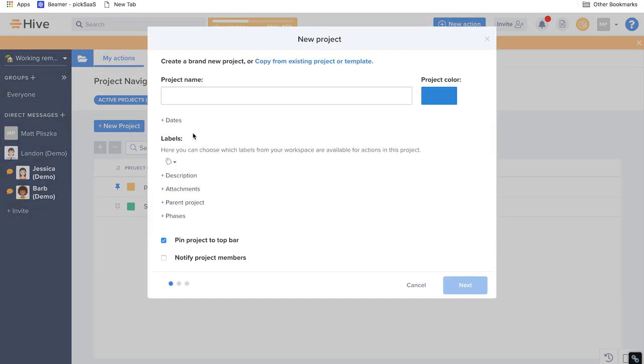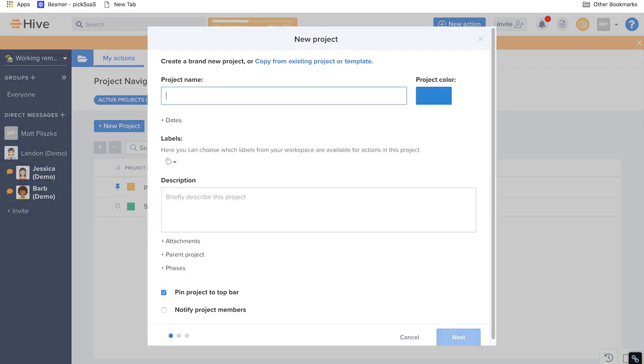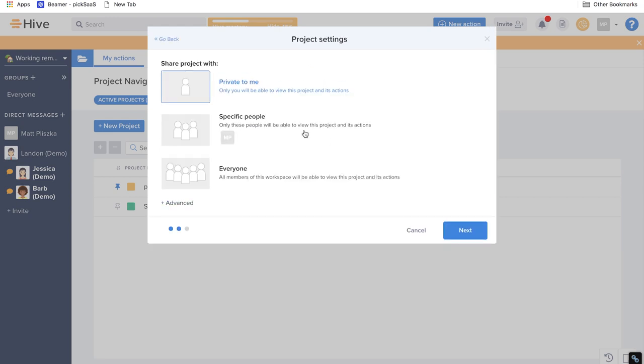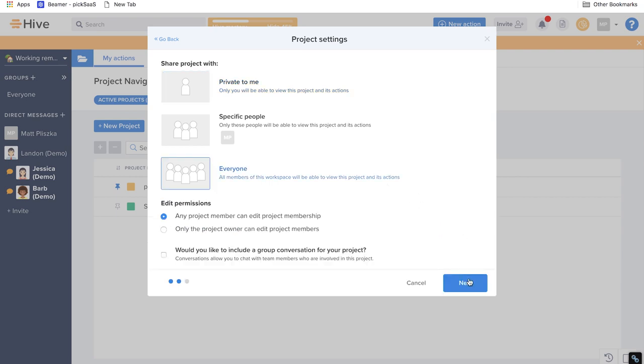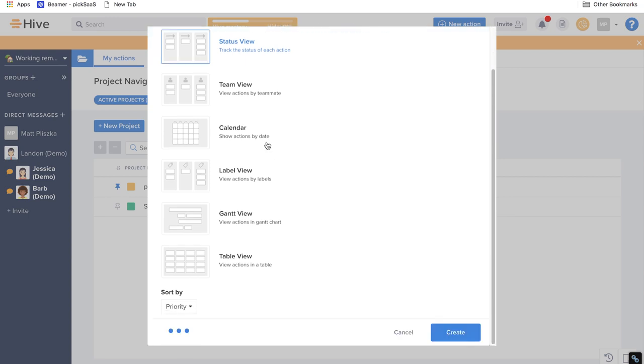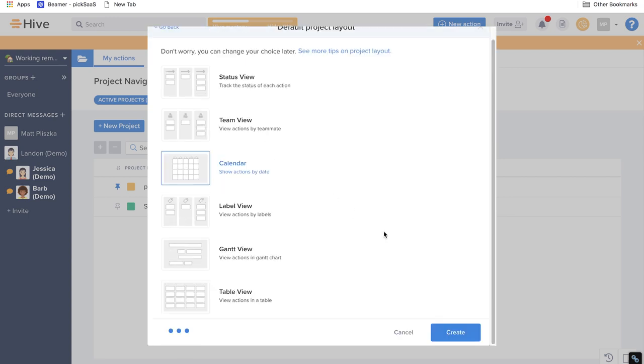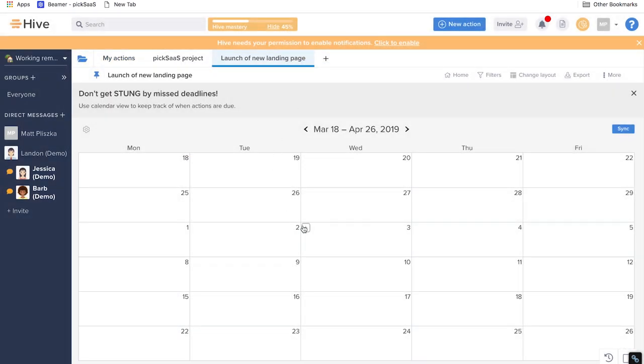New project can be created from scratch or you can copy it from the existing templates. Adding new project has three steps. Choosing project name, its color, dates, labels, description, attachments, parent projects and phases. Setting privacy. Setting it to private or for specific people or everyone in your team. And choosing project layout like the status view, team view, calendar, label view, Gantt view, table view. The one which suits your current project the most.